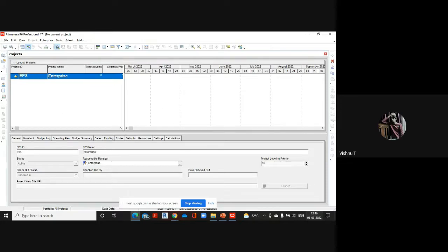The first thing that I would like to do when I open the Primavera interface is to set up an organization here. You all are working in Sriperumbudur College of Engineering, right? So your organization will also have a particular structure. At the top there will be your college. Under that there will be different departments and sub departments, and there will be people working in different departments and sub departments. Similarly here also, every organization will have to first create their enterprise structure.